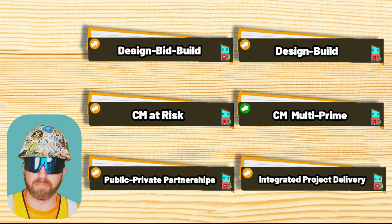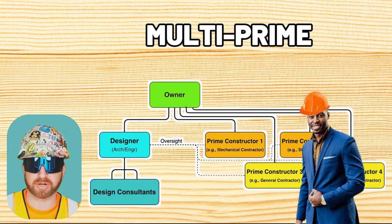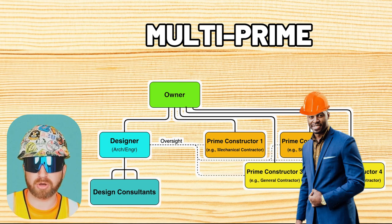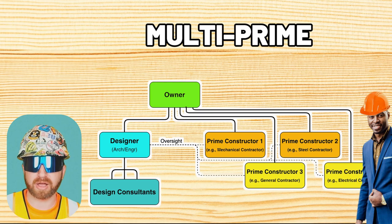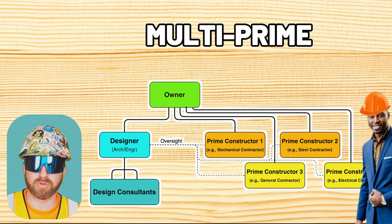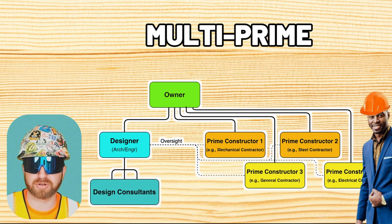Next is Construction Management Multi-Prime or CMMP, also known as multi-prime. Here, the owner essentially acts as their own general contractor, holding not one contract with a single GC but multiple contracts with trade or prime contractors — the biggest players in scope and dollar value on a project. This method is for owners who fully understand construction and want direct communication with each contractor. However, it can get messy and costly if the owner doesn't understand all the coordination that takes place between contractors behind the scenes.